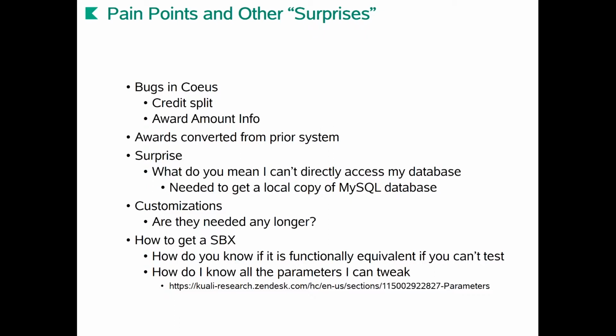So we had to work with Kuali to have them dump down nightly a copy of our SQL database to a place that we could access it, to bring it back to our campus so that we could have the raw data for debugging purposes or whatever. And that is what is used for our data warehouse folks to do the ETL processes to load our data warehouse. So that is something you want to make sure you consider if you have data warehouses, or if you think you need a local copy for debugging purposes, you need to get those things brought down.